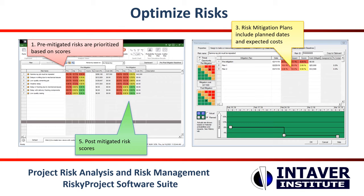The mitigation waterfall chart includes expected changes to probability or impact, date of completion, cost, owner, etc. The expected changes to the risk are visualized in both the waterfall chart and the pre- and post-mitigated risk cubes. The post-mitigated risk score is then presented in the risk register. The mitigation plans with associated activity and cost need to be added to the schedule, and risk assignments are then modified to the post-mitigated status.